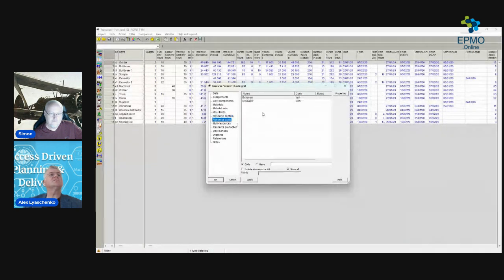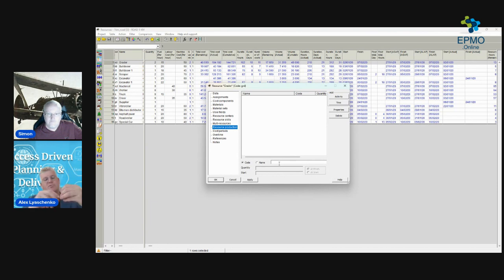Skills, so you can see these belong. We have two groups of skills, which are bulldozers and excavators. So I have multiple excavators and multiple bulldozers, but they all belong to a particular skill. That's what is called a pool of resources or skill of resources. It's different terminology, but the same thing. Resource production, that's something that might happen, where one part of a project produces resources which will be used by another part of the project.